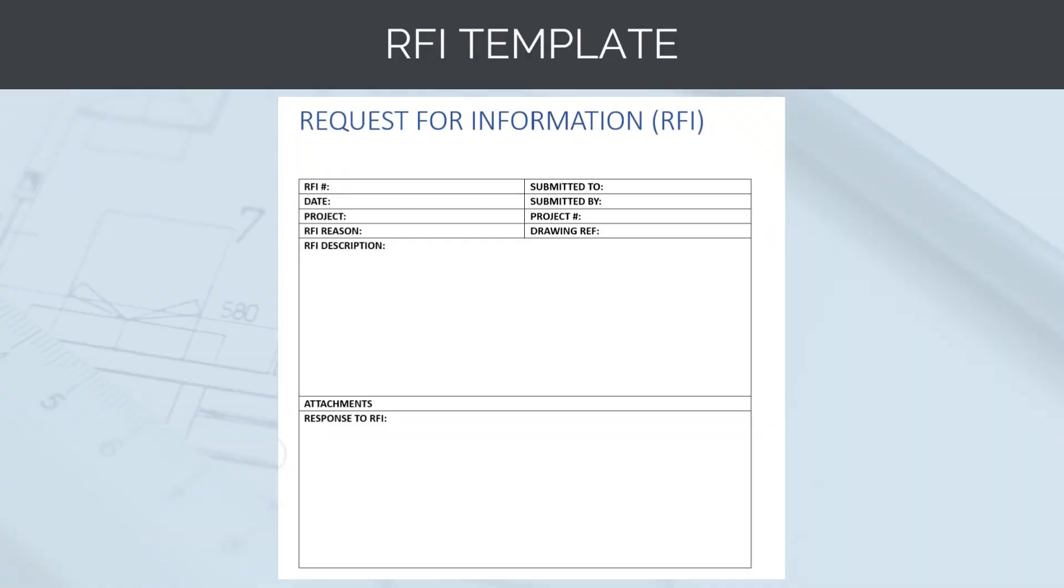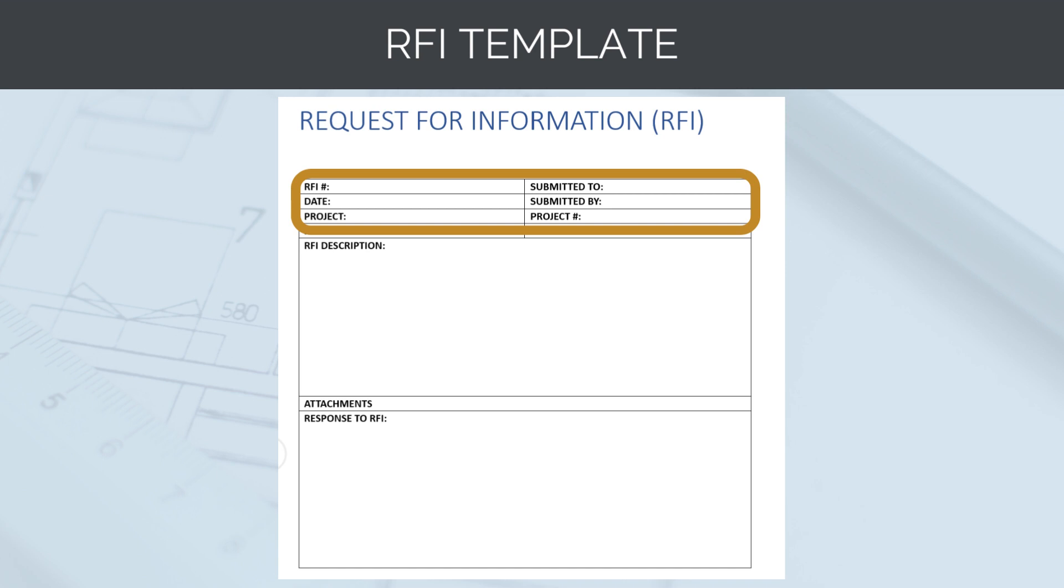RFI forms are relatively simple and easy to fill out. They are a formal way of documenting correspondence with the design team. At the top of the form, we enter basic information like the RFI number. This is a sequential number we would get from the RFI register. Then we put in the date of the RFI, who it was submitted to, who it was submitted by, and the project name and number.